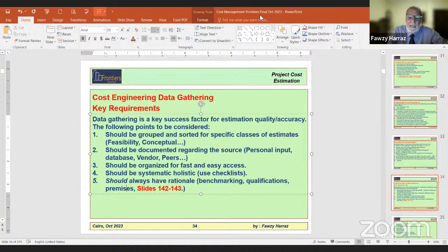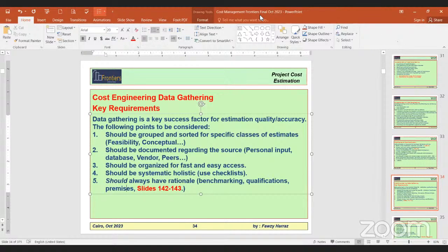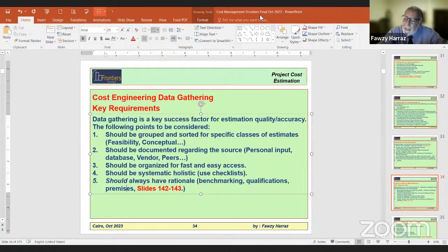So in this case, the project management team and the project controls should clearly consider at an early stage the scenarios of suspension or termination. At a certain time, you will be assured that he will not continue, so the earlier the better. You investigate and develop a suspension and termination scenario. You will regularly notify the contractor that he is behind schedule, that he is not responding to owner notifications.